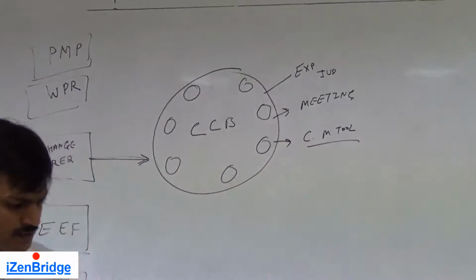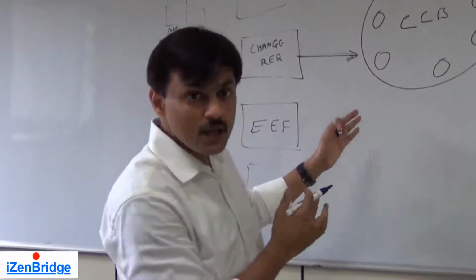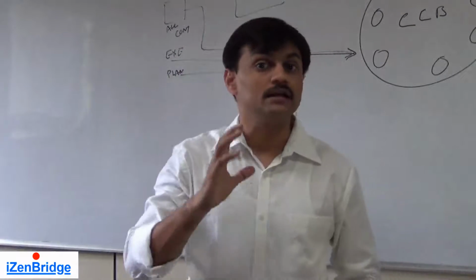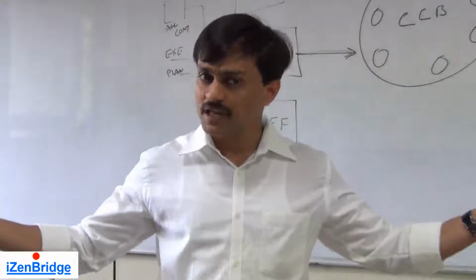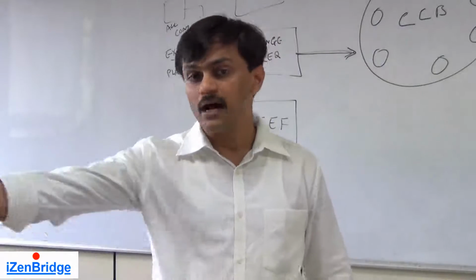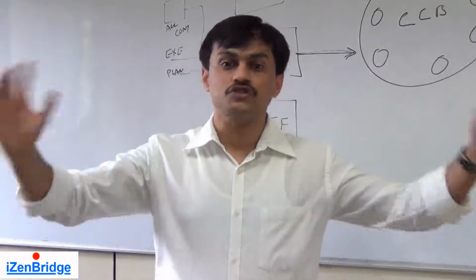Now you may think, I have a very small request. Do I need to follow this big process? It depends. In your project management plan, you can declare which types of changes can be approved by the project manager, or which types of changes can be approved just by the respective team leader. They also become part of the change control report.